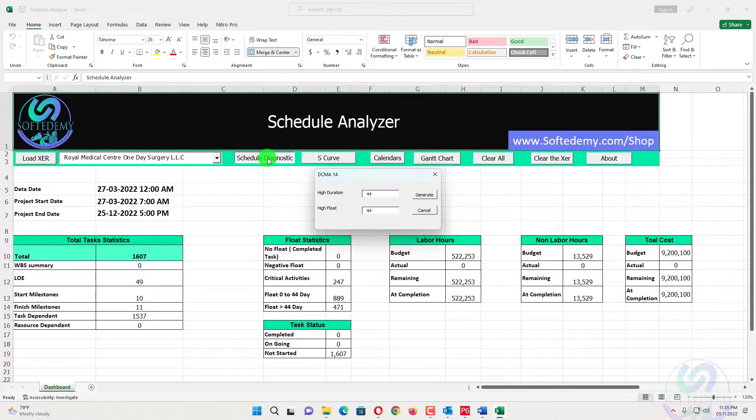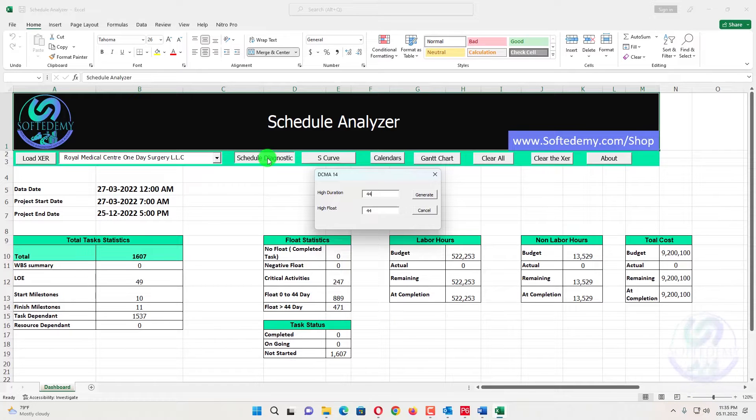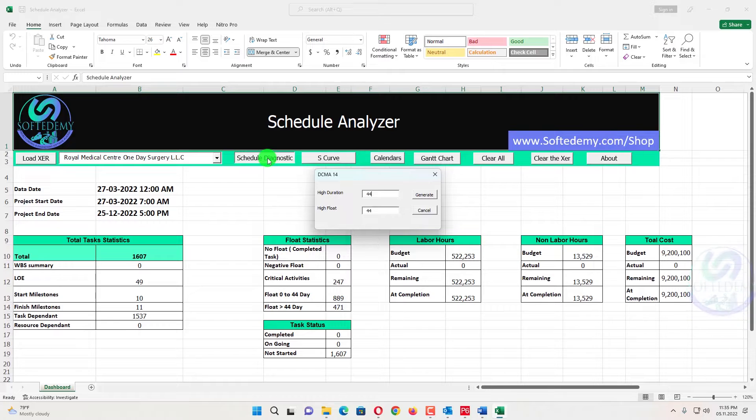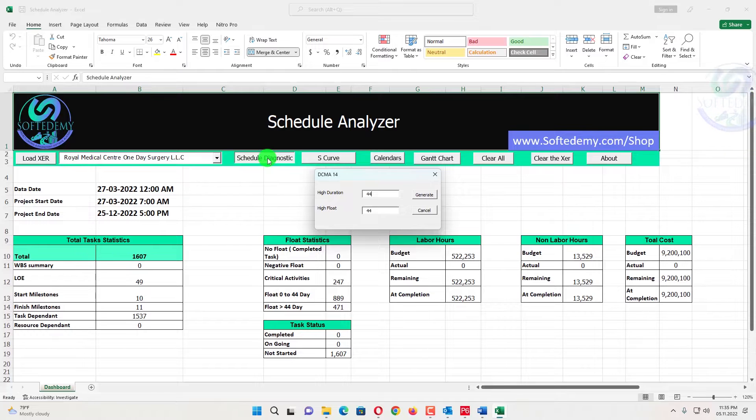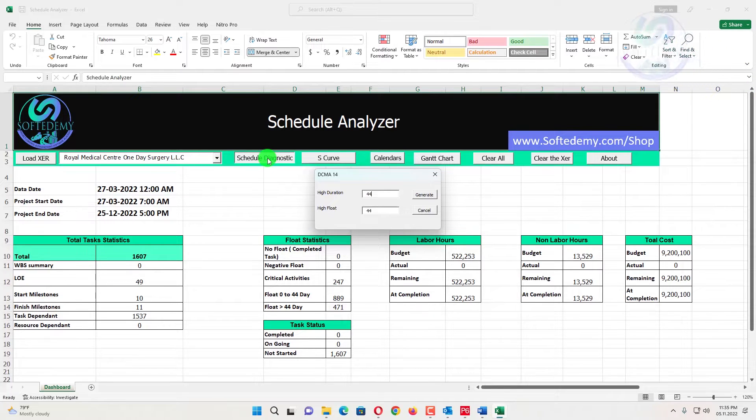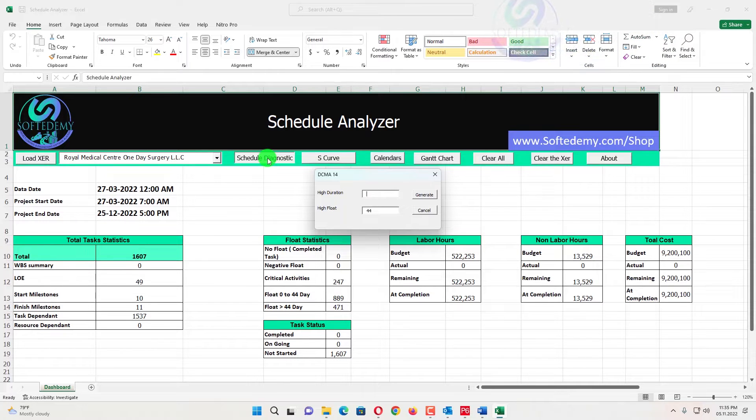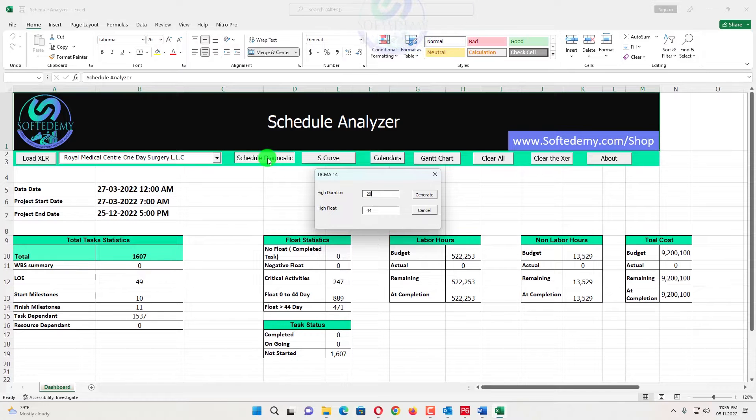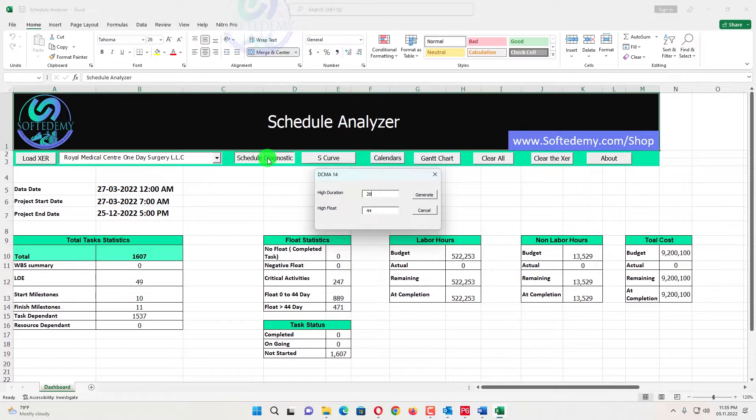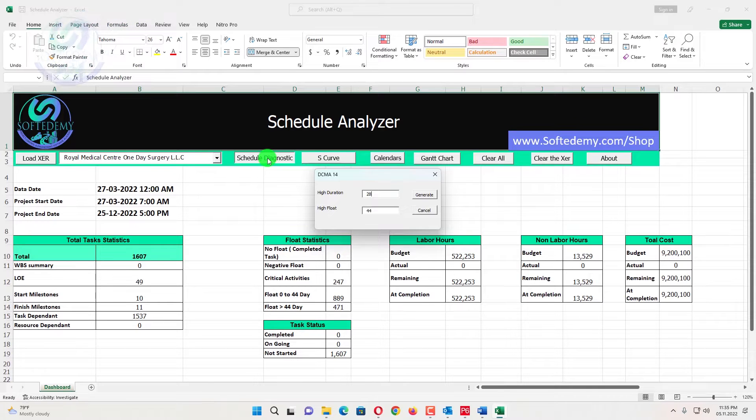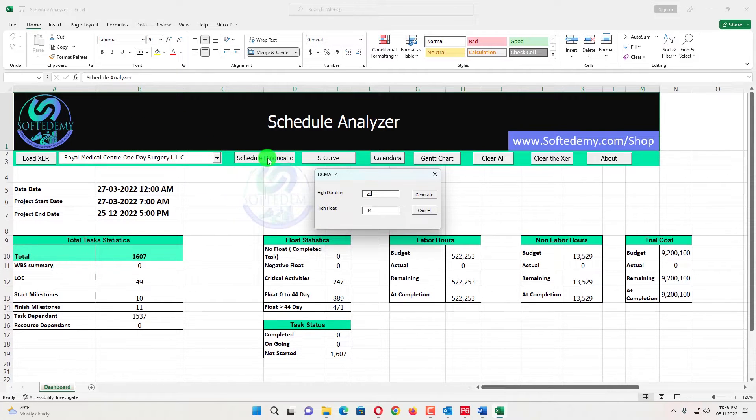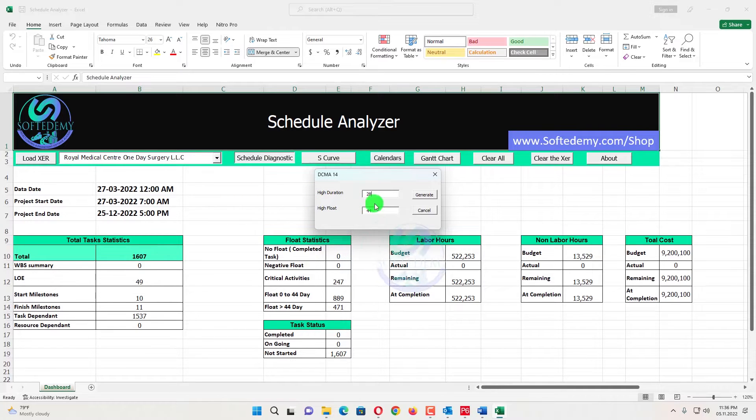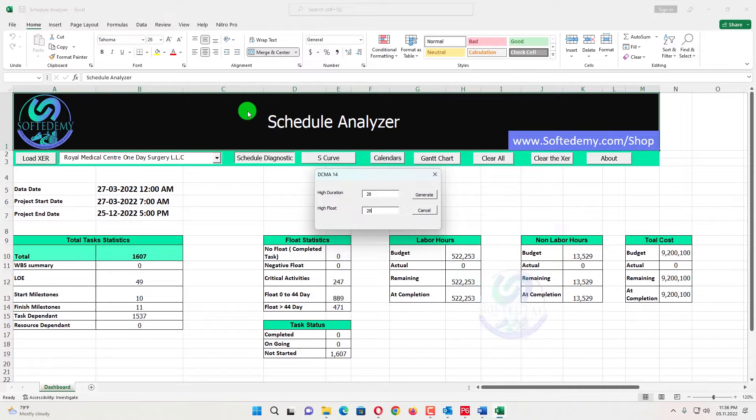What is your higher float? So the question is, do you know what is your higher duration? So the higher duration is equal to, if your project duration is like one year, then your maximum duration should be four weeks, 28 days, not 44. But as per different DCMAs, they say that 44 days should be a higher duration. But I recommend for one year project, it should be 28 days, not more than, because the activities having a bigger duration cannot be monitored and there should be a lot of out of sequence in it. So also if the duration is 28, the float should be the same.